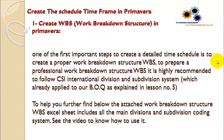Lesson number six, video number one: Create WBS (Work Breakdown Structure) in Primavera. One of the first important steps to create a detailed time schedule is to create a proper Work Breakdown Structure. To prepare a professional Work Breakdown Structure, it is highly recommended to follow the CSI international division and subdivision system, which is already applied to our Bill of Quantity as explained in lesson number five.